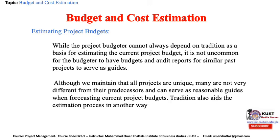This gives rise to both inflation risk and technological risk. The longer the project life, the less the project manager can trust that traditional methods and costs will be relevant. Every organization has its idiosyncrasies — one firm charges the project R&D budget with the cost of training sales representatives on technical aspects of new products; another adopts special accounting practices for government contracts. Unless the project manager understands the organizational accounting system, there is no way to exercise budgetary control over the project. The project manager simply must be familiar with the organization's accounting system.